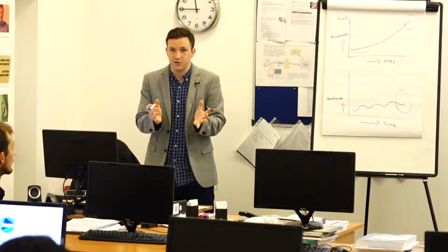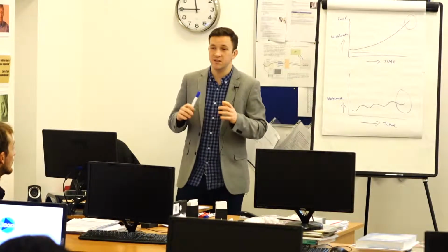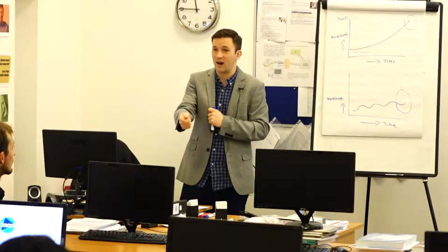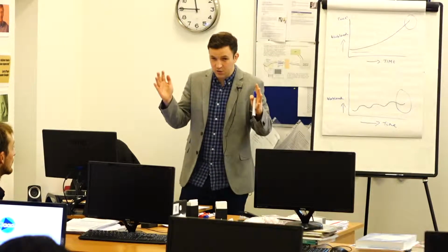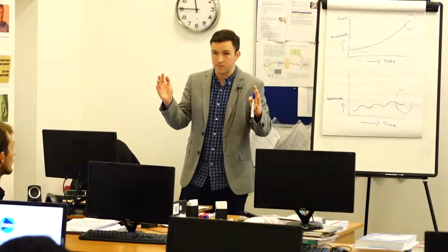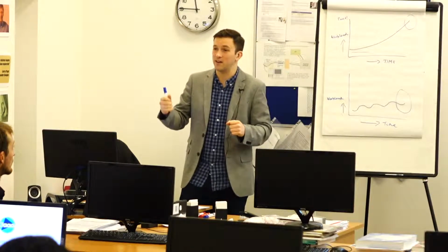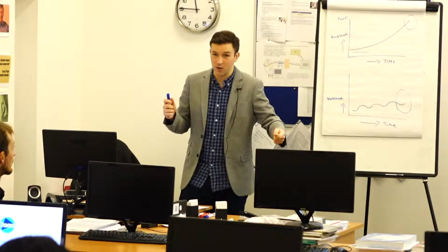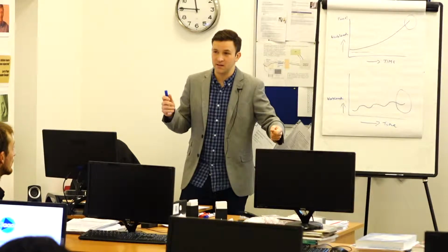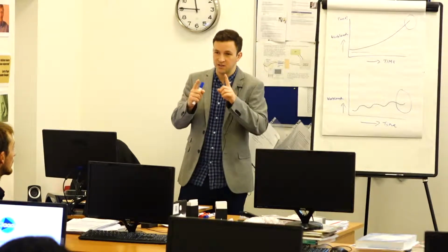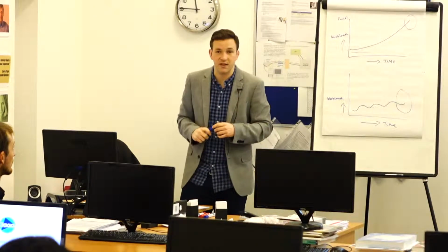So everybody sits in a group, and you describe a new feature to the group, and then everybody has an opportunity to put down a card where they say how long they think it's going to take for the new feature. If there's a wide variation in the numbers put down, then the person who put down the highest value is asked to explain why they put that down. Then the person with the lowest value is asked to explain. And then you go again until you're only two cards out, say 2 and 3, at which point you just take the highest.